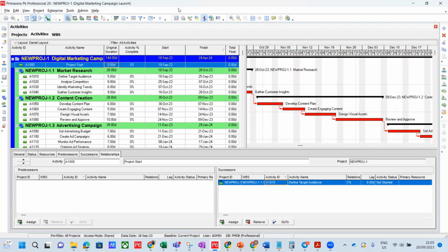And in all that, it has a cost to it, because Daniel has got over 5 years experience. They might call Daniel a senior design engineer, while Ade will be design engineer. So their rate, how much they will earn per hour when they are bidding for the job, will be different.